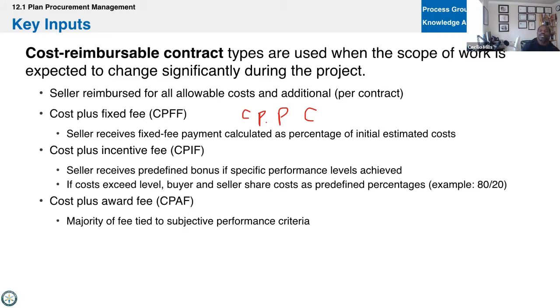Do you guys remember the movie Speed, with Keanu Reeves? That was based on the '94 Irvine earthquake, which some people may not know. I lived maybe 60 miles east of that at the time. They had a contract where they paid the contractor $1 million for every day that they got the project done ahead of schedule. That contractor ran rolling 8-hour shifts, and they worked 24 hours around the clock. They got it done like 30 days ahead and ended up making $31 million additional. That was a big deal in the state here because we'll never do that contract again.